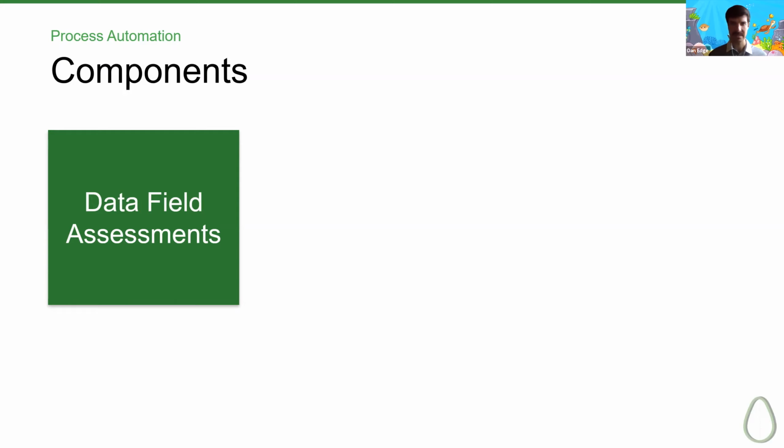The best part is that the PM only had to update what changed in the current month. When we kick off the process, we pull the information from last month using data field assignments right into that update process. The PM makes any updates, maybe we moved from the design phase to the construction phase. And then we push those updates back to the project details tab.